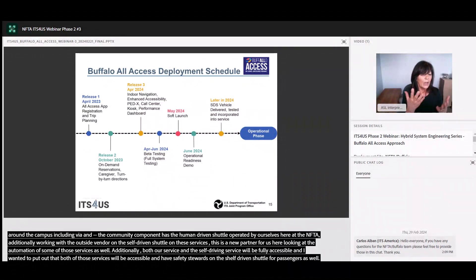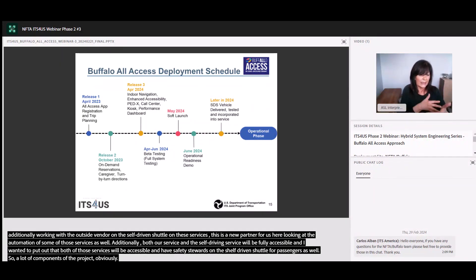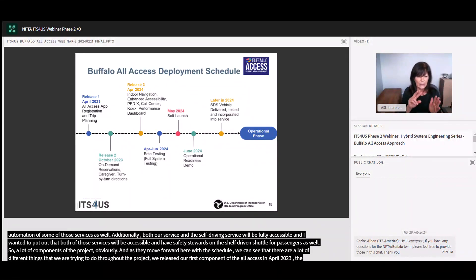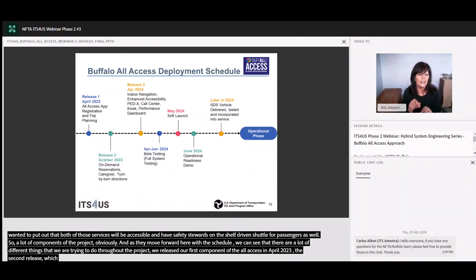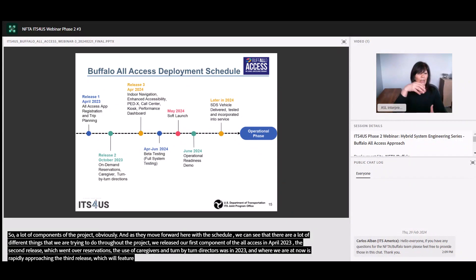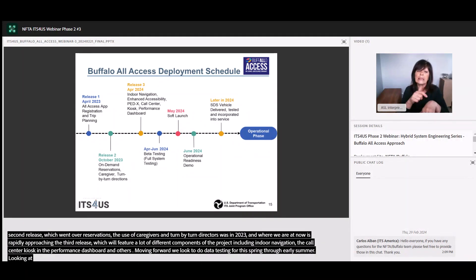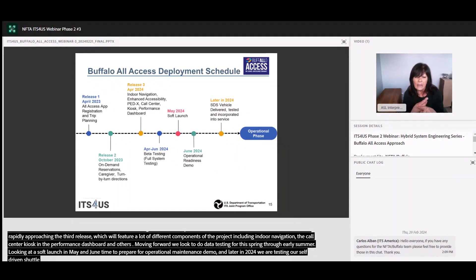There are a lot of components of our project. We released our first component of the All Access app in April of 2023. The second release, covering on-demand reservations, the use of caregivers, and turn-by-turn directions, was in October of 2023. Where we're at now is rapidly approaching our third release, which will focus on indoor navigation, our call center, kiosk, the performance dashboard, and others. Moving forward, we'll be looking to do beta testing for the full system this spring through early summer, looking at a soft launch in the May-June timeframe to prepare for operational readiness demo. Later in 2024, we'll be testing our self-driven shuttle through the vehicle delivery and figuring out how to incorporate that into the full service overall.